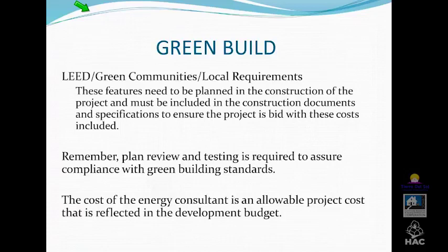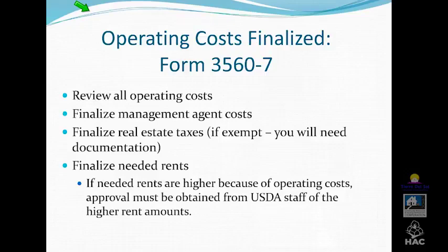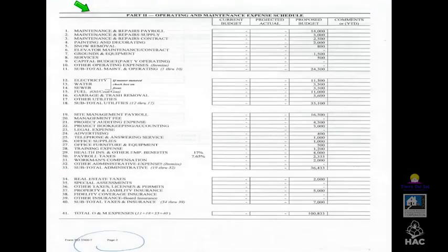USDA issues something called a statement of work, and you can order the appraisal. You will pick the firm. I encourage you again to work with the USDA staff person, because they provide a lot of guidance on this appraisal, and you don't want your appraisal to get kicked back because it's not compliant. But you will select the appraisal company and you will pay for that. And there's several $1,000s that you will have to pay at this point to order the appraisal.